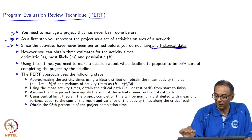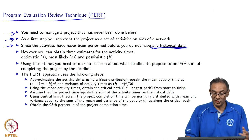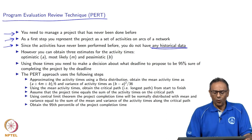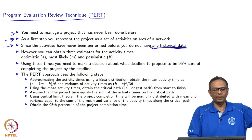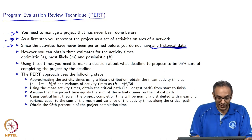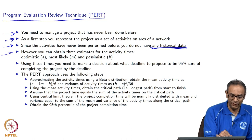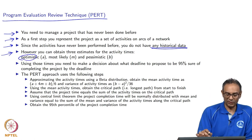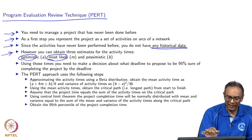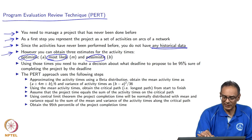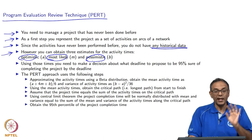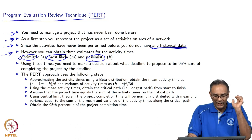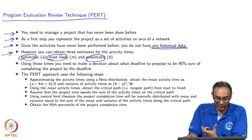Since we do not have any historical data, we are not going to be completely non-parametric — we are going to have some parametric estimates. For example, we can at least guess the fastest time we can complete an activity. That is called the optimistic estimate. We also estimate the most likely time and the pessimistic or worst-case time. So we have three numbers: A (optimistic/smallest), M (most likely/middle), and B (pessimistic/largest).